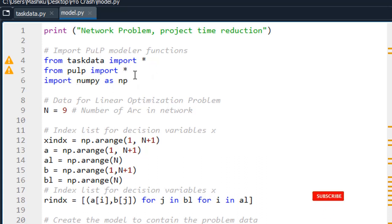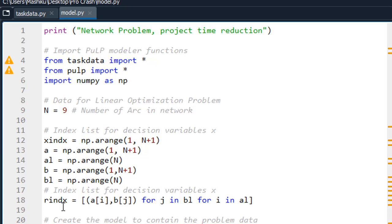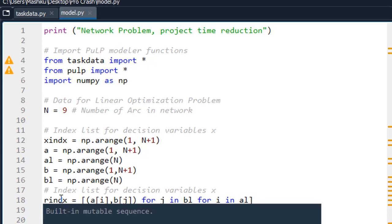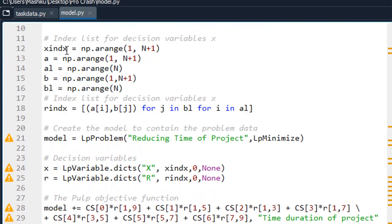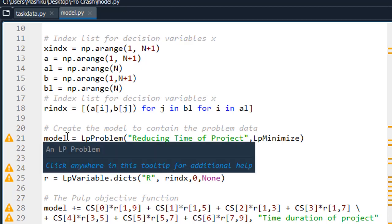I am also importing the important library used for solving different kinds of LP models, which is the PuLP model function. We also have NumPy because I have some ranges created in this dataset. After importing the libraries, you have to declare the number of arcs in your network diagram, since we are dealing with an activity-on-arc network diagram. Then we produce the index for the X variable and the index for R. You can go back to the previous slides where I demonstrated the general LP model to see the meaning of X and R.